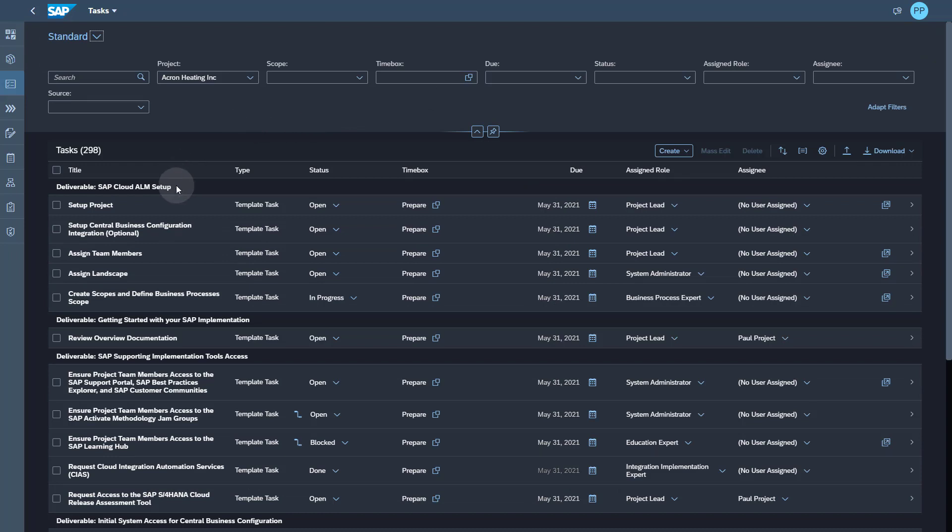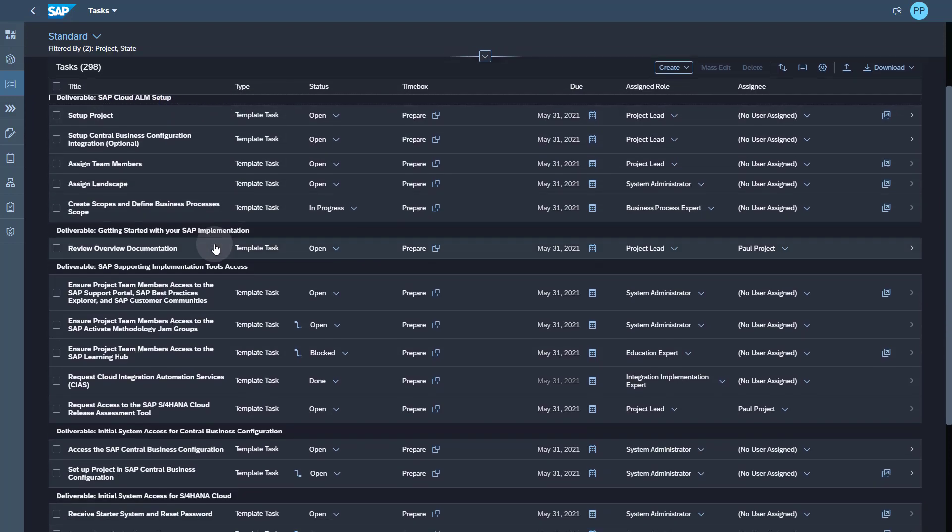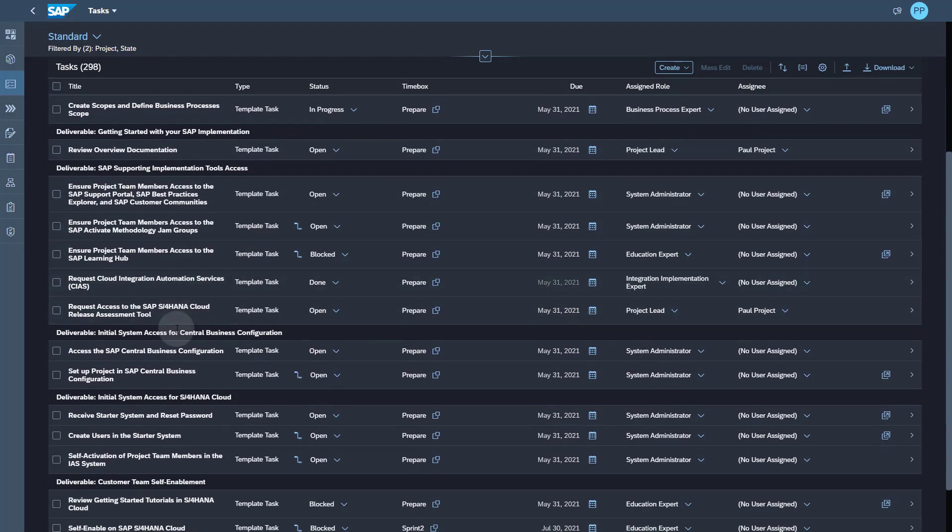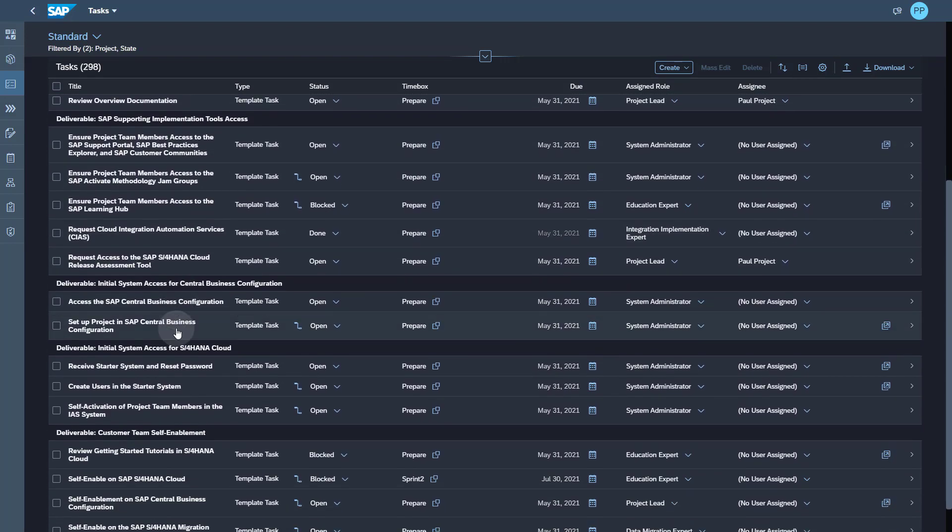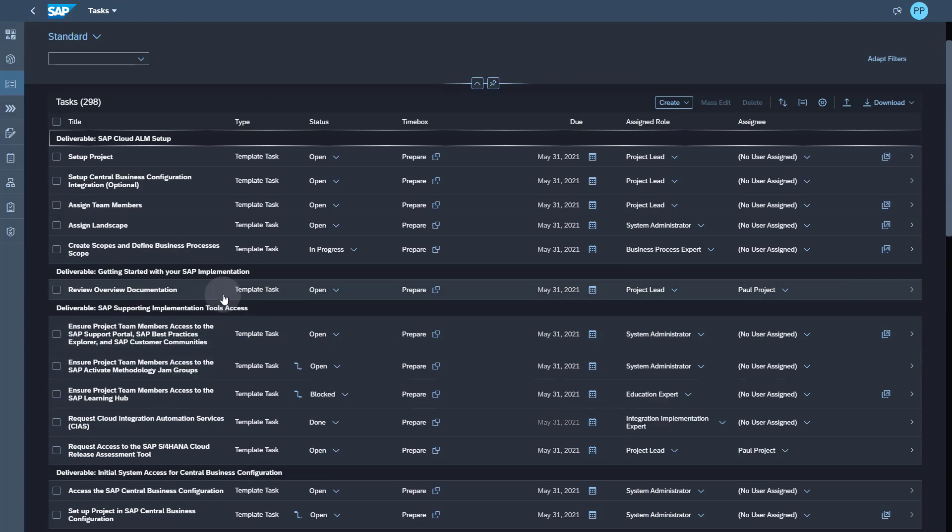There is one deliverable which is a special one provided by SAP Cloud ALM, but most of the deliverables come from the Activate content and even the sequence of deliverables is the same as provided by SAP Activate methodology.